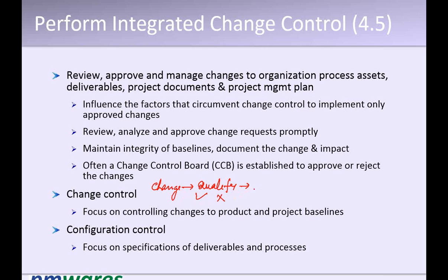Once you qualify it, you do an impact analysis with respect to how much is the impact on cost and time. Once the impact analysis is done, you submit it to the Change Control Board.